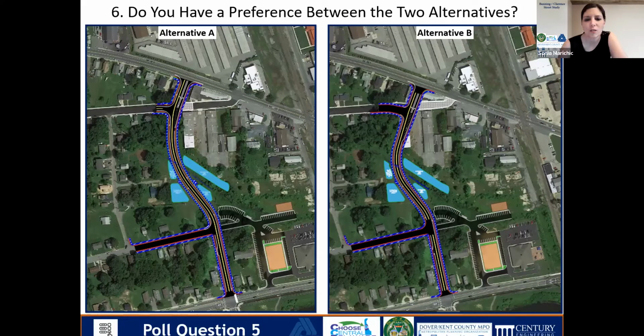Thank you. Is the purchase of either the 2 residential or commercial properties included in the funding request for this project? Well, again, if it became a project, yes, that would be included. But right now it's a study, so we're not considering that. As part of our recommendations report, we will provide a conceptual cost estimate, just a relative comparison of the 2 alternatives from a cost standpoint. That will be a general comparison of purchasing the 2 residences versus the 2 commercial structures. So there will be a conceptual price there, but we really won't have those details until this does become a project, if in fact it does.